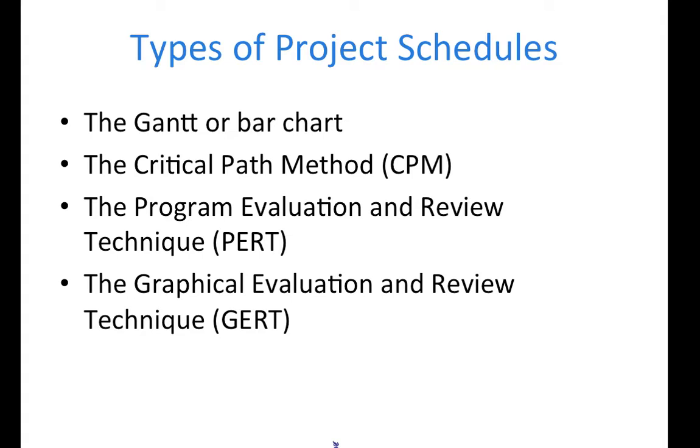The critical path method, or CPM, is the scheduling tool that places tasks in a network or flowchart of project tasks. Using time estimations for each task, earliest and latest start dates can be computed for each task to get the project completed on time. One sequence of tasks will constitute a critical path of tasks. A critical path of tasks that need to start and end on time for the project to finish on schedule.